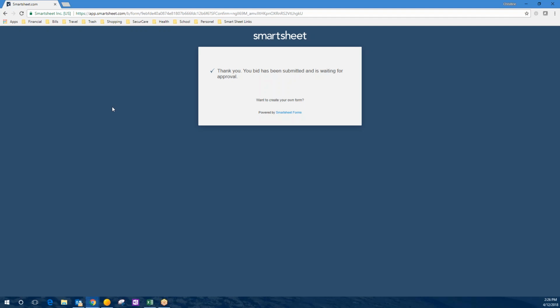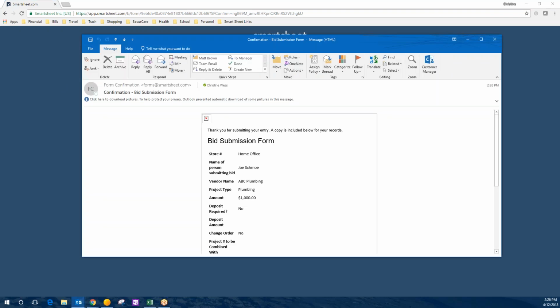And then this automatically kicks off to whoever the approver is. So whether it's within the area manager's approval limit, the regional manager's approval limit, my approval limit, our CEO's approval limit, it'll automatically kick an email and it'll say, hey, this person just submitted a bid. And so I'll show you a copy of the email.